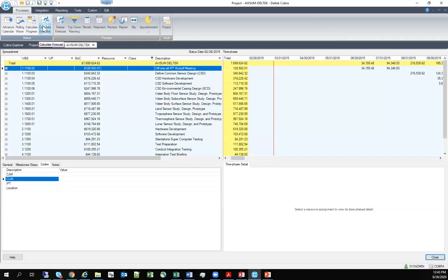And you can have more than one of those forecasts at any time. It's not unusual to have a manual forecast or two, and then a handful of statistical forecasts, maybe a best case, worst case, to kind of bracket the PM's forecast and ask, does it make sense? And generally, if it's within the range of the best case, worst case, then yeah, that's probably not too bad. It makes it easy to identify some outliers.